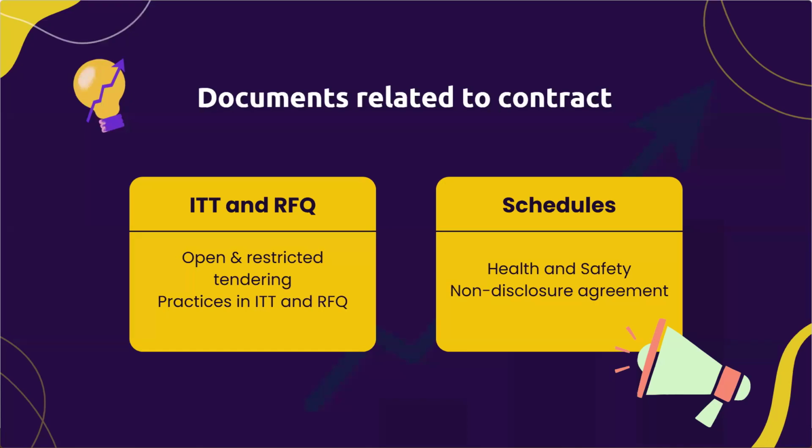We only consider the price and ask the supplier to submit a price based on the known specification. RFQ should be used when we already know the suppliers, like when they are already shortlisted or within a framework agreement, and we can send them an RFQ and then award them the contract.